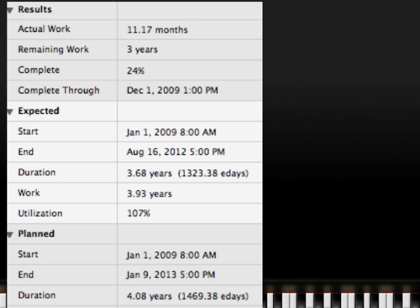This was evident on the previous slide. The grey boxes depicting planned durations came after the blue boxes, which represent the expected duration of activities. The overall planned duration was about 4 years, or 48 months. Based on the rate of performance, the project is to be finished in about 44 months.